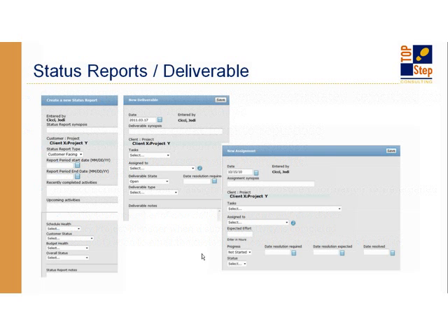Okay? So what's on the status report? Well, of course, the synopsis is a required field, so you would put status report for XYZ date. If this is a customer-facing or an internal status report, for what period are we reporting on, what have we finished, and what's happening next. And then general drop-downs for schedule health, budget health. Is the customer happy? Are they on track? Are they holding up the project? What's the overall status of the project?